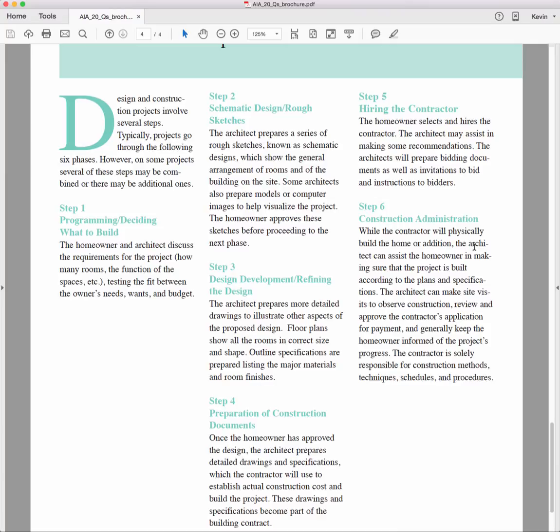Even though when you're building a house, you typically hand it over to a general contractor in step 5, a lot of times you continue to pay the architect to do supervision on the job. Okay, who's going to keep the general contractor honest as to whether or not they're building it to the exact specifications? Well, maybe not you, the user. You might not know enough.